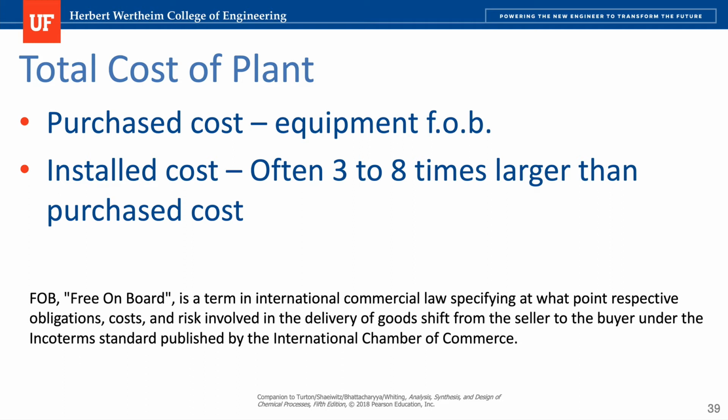Remember that equipment FOB means free on board. That is a term in international commercial law specifying at what point respective obligation, cost, and risk involved in the delivery of goods shifts from the seller to the buyer, under the Incoterms standard published by the International Chamber of Commerce. So this is the legal term, but basically it's the equipment as you purchase it from the company. Then you purchase that equipment, but you are the person who has to pay more to see the installation